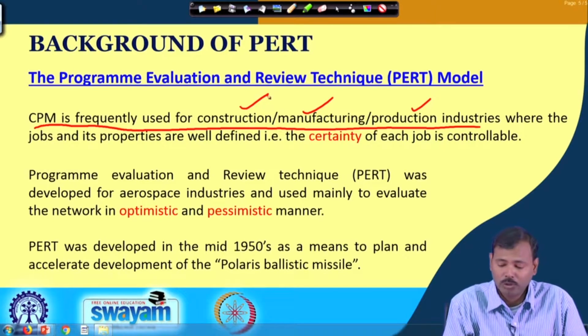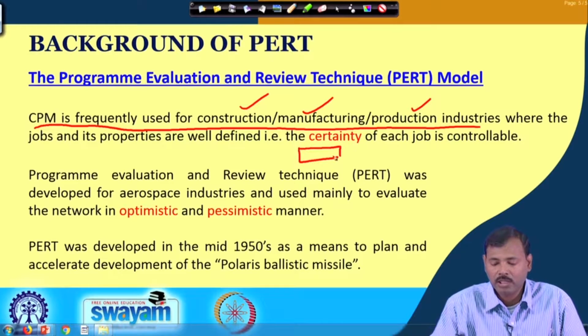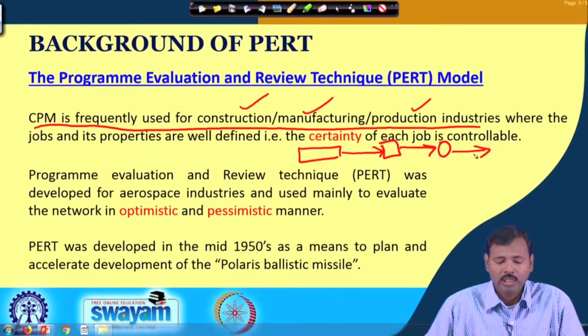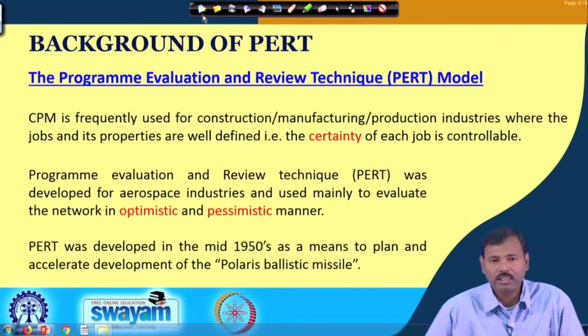Suppose we have a soft drinks manufacturing system, where first the bottle is prepared by a machine with a fixed time, then it is moved, filled, sealed, and then labeled. In that way all the parts are carried out by the machine automatically, it is time bound, and fixed times are consumed in those cases. That is why it is considered deterministic, and the critical path method is probably an accepted method of analyzing this network.